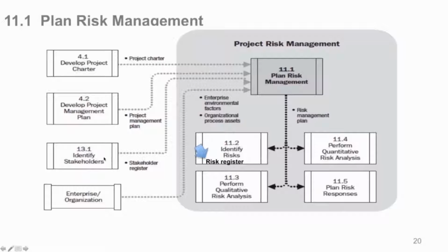The stakeholder register is a very, very significant input to risk, because you're talking about people here, you're talking about your stakeholders, and each one of them has what? They have their views about risk. They have a risk appetite. Some stakeholders may be willing to take great risks to achieve an outcome. Some stakeholders may be very risk averse. They say, oh, boy, we've got to tread really lightly here. Don't take any risks. Make sure nothing happens.